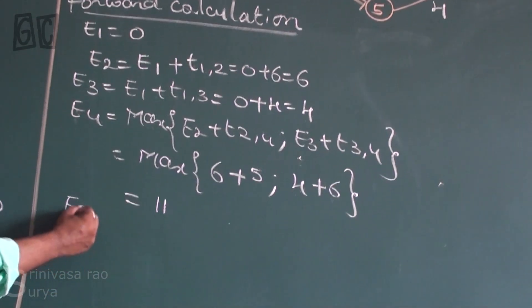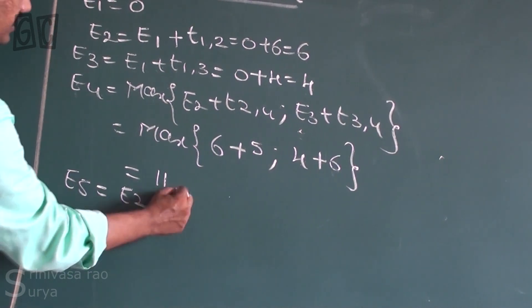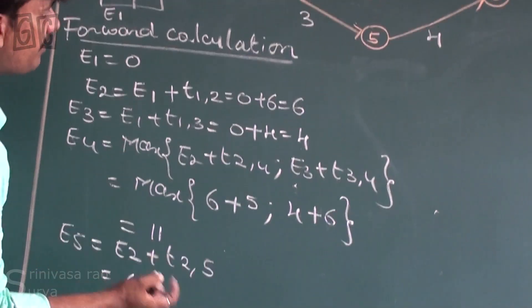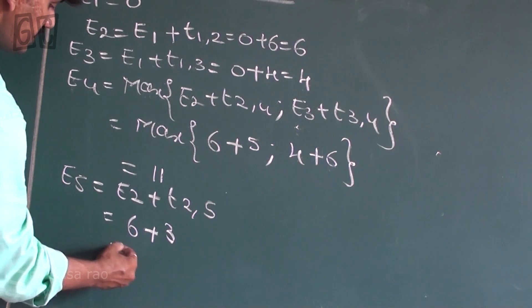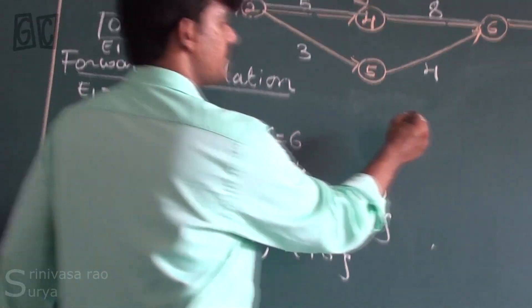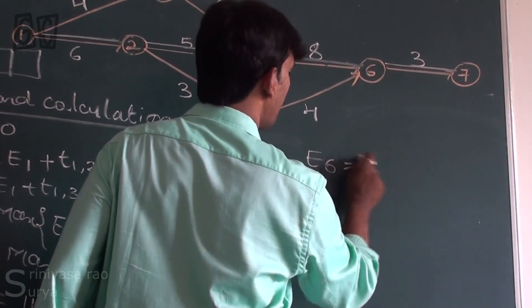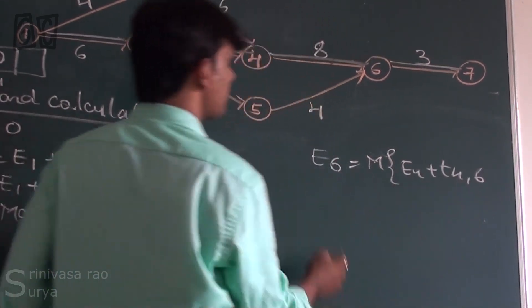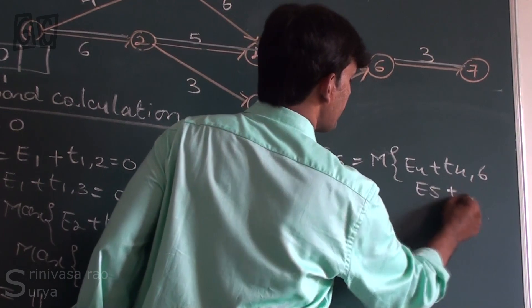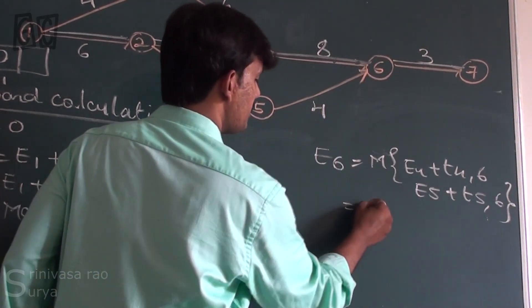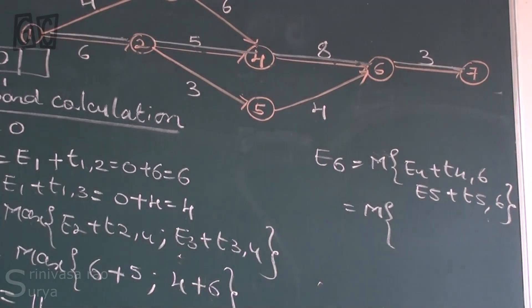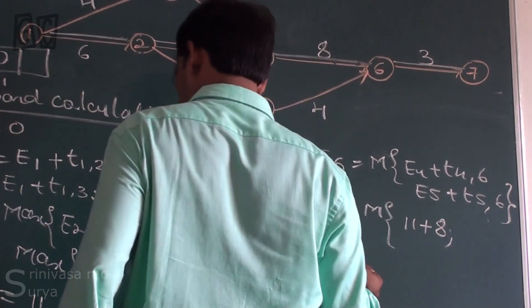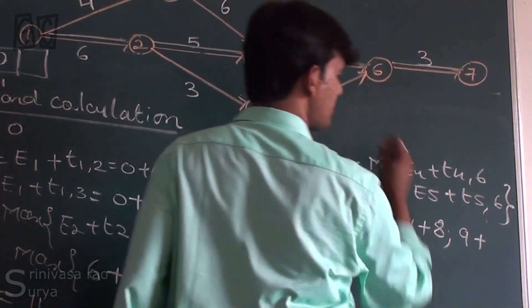Now E5: E5 is coming from only node 2, that is E2 plus time taken from 2 to 5, which is 6 plus 3 equals 9. E6 is coming from E4 and E5, so we take the maximum of E4 plus time taken from 4 to 6, and E5 plus time taken from 5 to 6, which equals maximum of (11+8) and (9+4), giving E6 equal to 19.